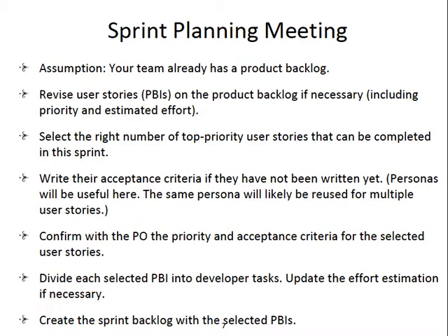Okay, so you start with one user story written from the user's perspective, and you break it down into three developers' tasks. So you change from user's perspective, PBI, to multiple developers' tasks. And after you have done this, dividing into developers' tasks, then you can estimate how much work is required for each developer's task. Then you add them up, it becomes your total effort estimation for this user story.